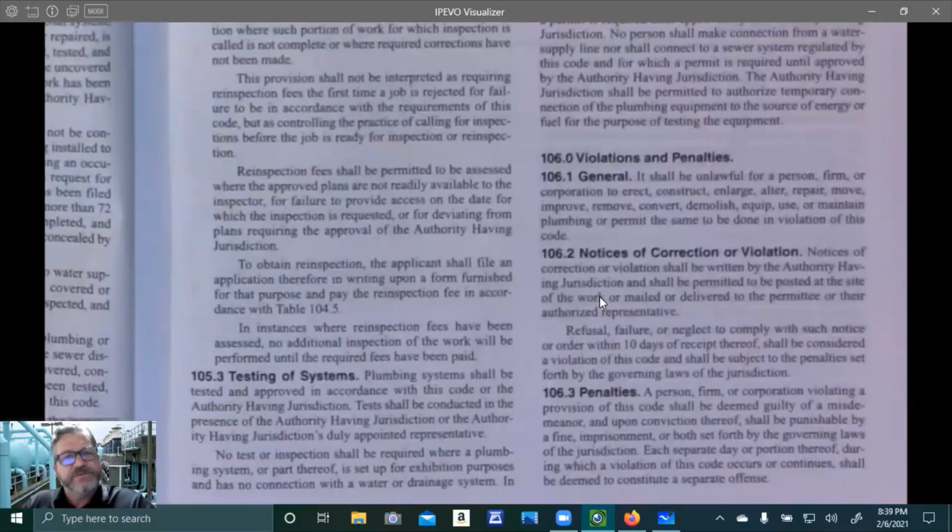And you'll see why when you get out here. He said, you want me to fail your work? And I said, yes. He said, well, why did you put something in that you knew was going to fail? I said, just come out here and I'll show you. So the inspector showed up. I showed him the request for information. I said, this is what they wanted. I put it in. This is what I wanted to do. And he says, yeah, that's what you should have done. And so he said, don't worry, I'll write you your notice of correction. So I failed my test on purpose.